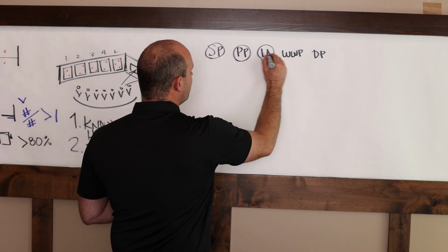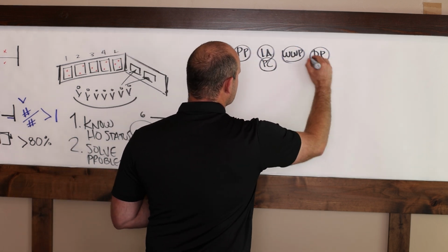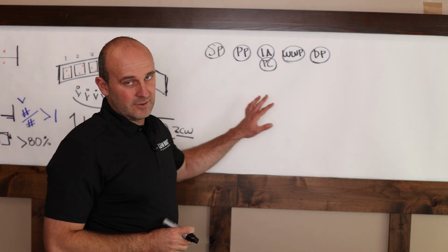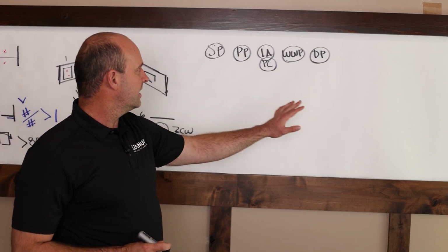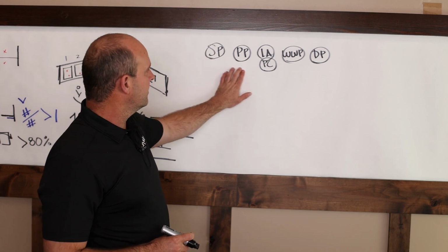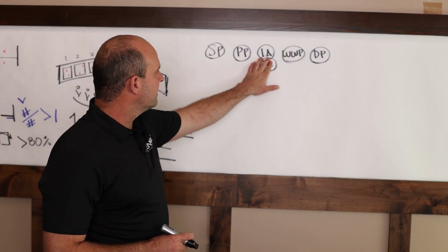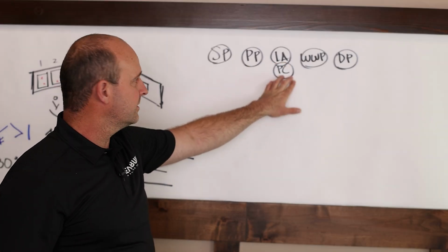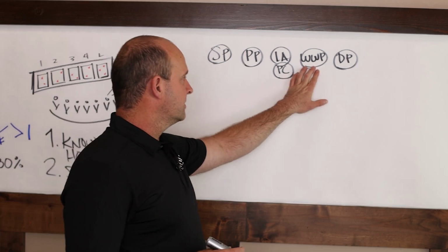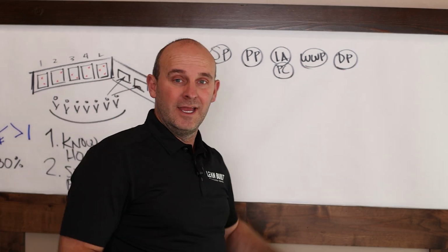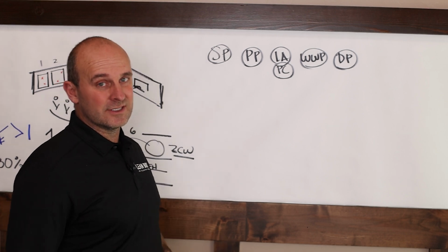When I draw this on the board, people say, Jay Money, there's a lot of stuff there. Hey, this is just how we do it. These are the check-ins. We do strategic planning early on, pull plan every phase, do a look-ahead plan 3 to 6 weeks out, a pre-con meeting for every new contractor to the site, a weekly work plan for every week, and a day plan for every day. That's just how it's done, right?